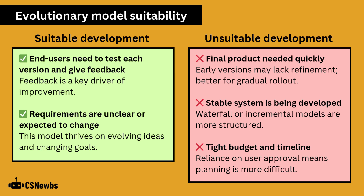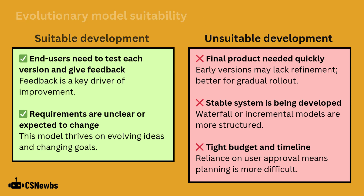However, the evolutionary model is not suitable when a final product is needed quickly, as early versions may lack refinement and it's much better suited for a gradual rollout. It's also not good when a stable system is being developed, as more rigid models like the waterfall model are better in this case. Finally, if you have a tight budget or a strict timeline, the reliance on user approval makes planning more difficult.